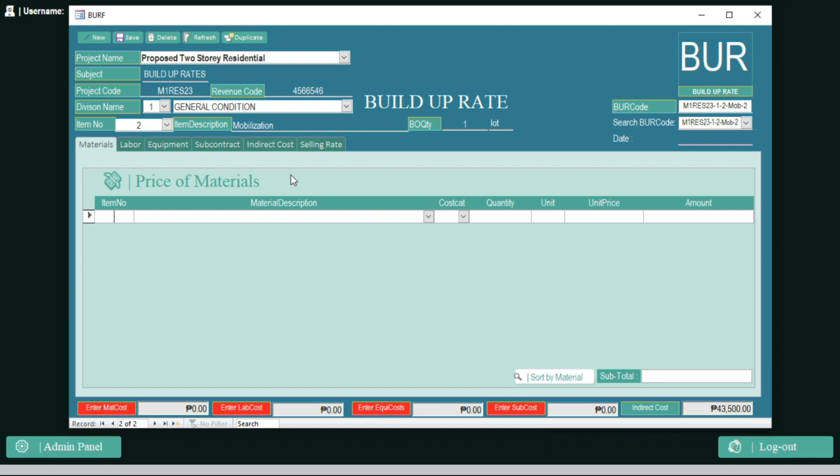For example, column. If this item is column, you need to make a material for 1. Ready mix. 2. Rebars. 3. Tie wire. 4. Formworks. Do you get what I mean? These materials are directly charged to the item and it is part of the building, correct?